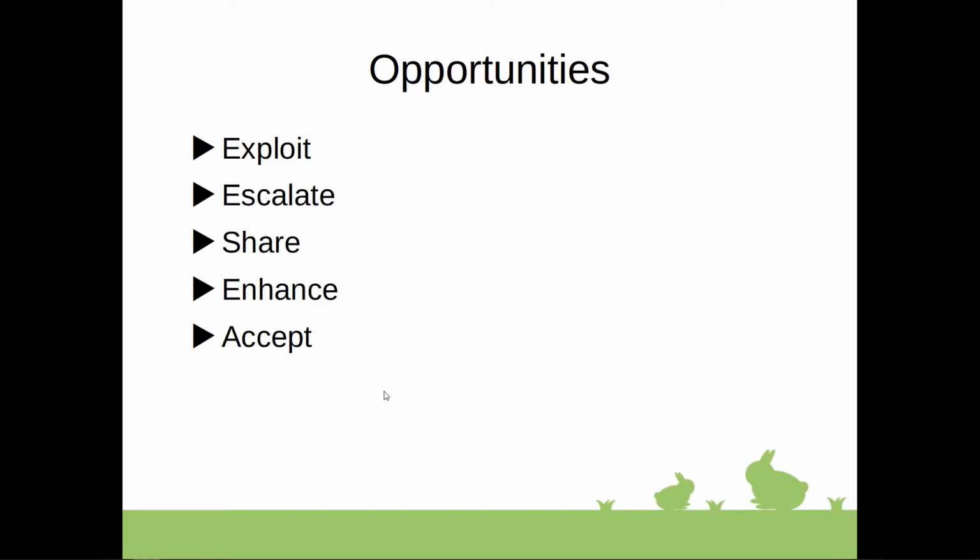Once the set of risk responses has been developed, it should be reviewed to see whether the planned responses, both for threats and for opportunities, have added any secondary risks. This review should be done regularly.